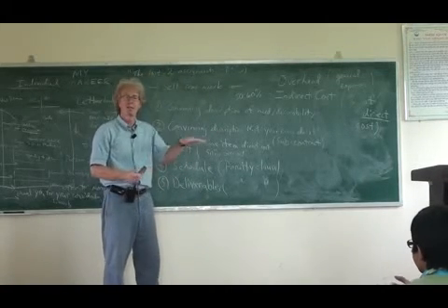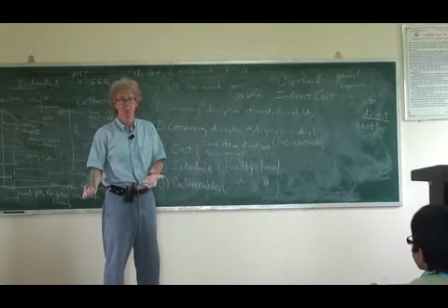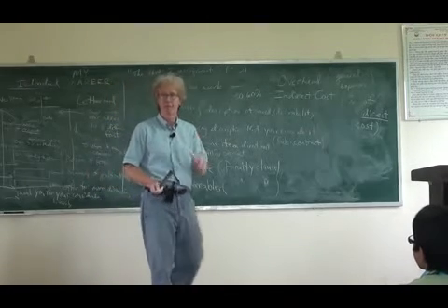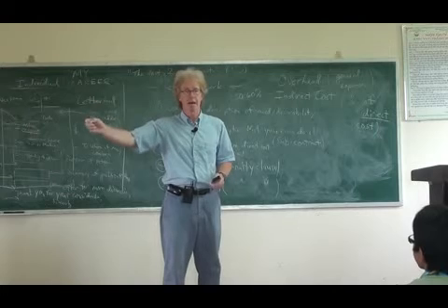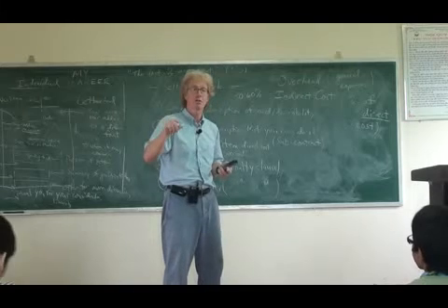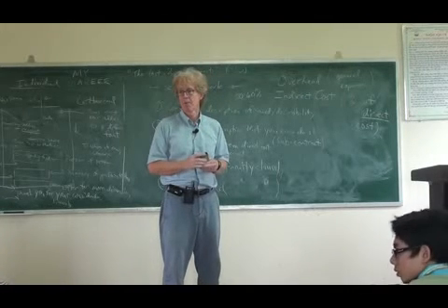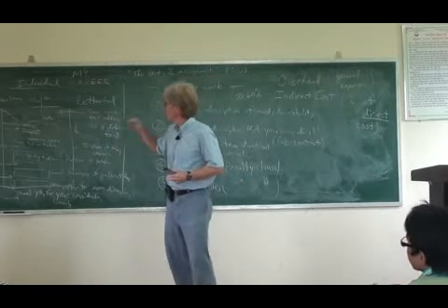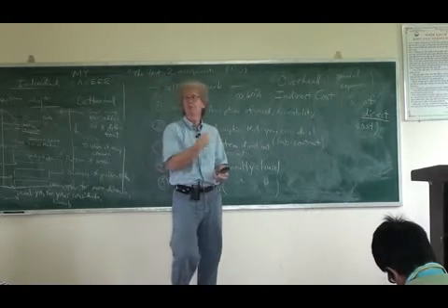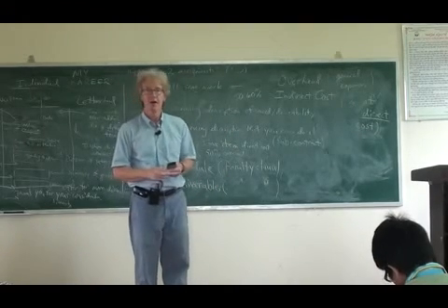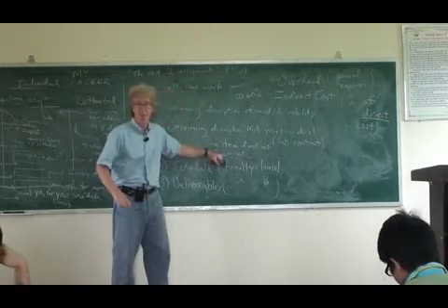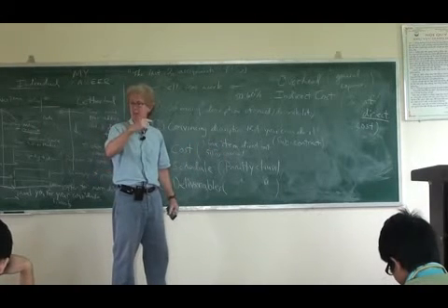Then maybe the next line is something like health insurance, which I think isn't an issue because there's a good national health insurance plan. But in the U.S. we have a terrible health plan. Our national health plan doesn't really exist. So every person must go and buy their own health insurance. And that's a big expense. So I might have then, on the next line, health insurance for 6 months. Well, usually if you work for a big company, they will pay your health insurance. But if you're working for yourself, like this proposal, then you have to pay for it. So health insurance might be another 10 or 20% or something of salary. So the next line in the direct cost might be health insurance for 6 months, 20% of salary.